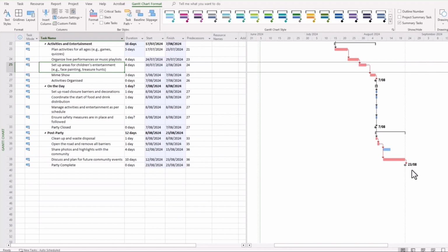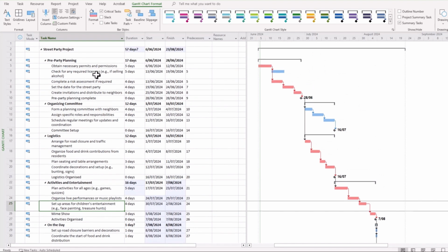So it's a very, very useful tool for project managers, particularly when it comes to identifying risks and issues within your project. For example, when putting together your risk register, you no doubt will want to have a look at these tasks that lie on the critical path and obviously apply the weighting for any risks that have the potential to affect those tasks as it should be deserved. So, critical path analysis, as you can see, is very easy in Microsoft Project and is a very, very useful tool to add to the repertoire.